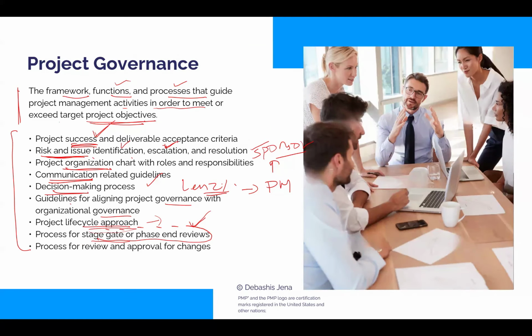So this stage gate or phases, is it similar to milestones in a project? No. Okay, understand this way. Every end of a stage is a milestone. But milestones are not confined to the end of a stage. A milestone is any major event. So the end of a stage is a major event, so a milestone. For example, project kickoff is not the end of a phase, but it is a milestone. So there could be milestones beyond stage ends. Thank you. Welcome.